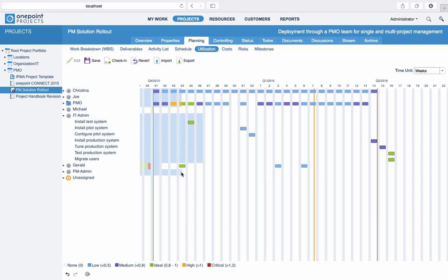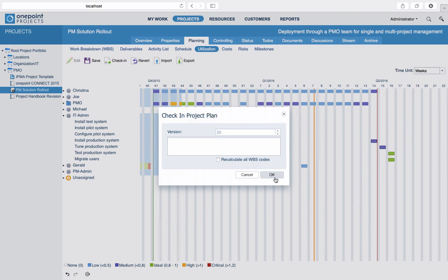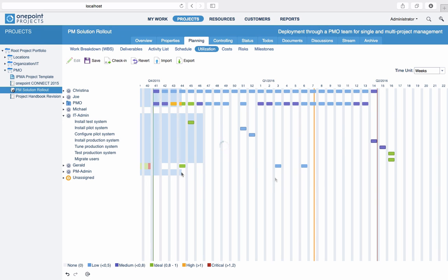This makes optimizing your resource planning a lot easier. Finally, do not forget to check in your project plan when you are satisfied with your planning changes. Only then will your new plan version become visible for other users and new or updated resource assignments be distributed to your project contributors' activity lists.